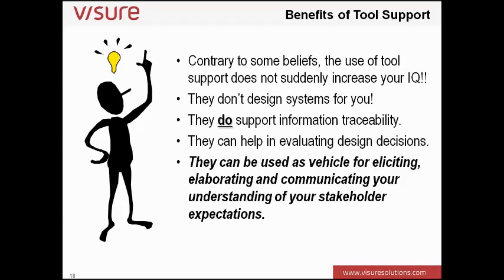And that is really important, that this can be done in real time and also show the impact of change before you actually commit to making that change. What is touched if I make that one change to that one requirement? What is touched throughout the world of text and the world of pictures, the world of models? What parts of my system, what parts of my project are impacted if we were to proceed to make that change?